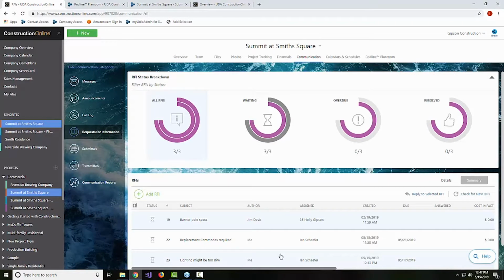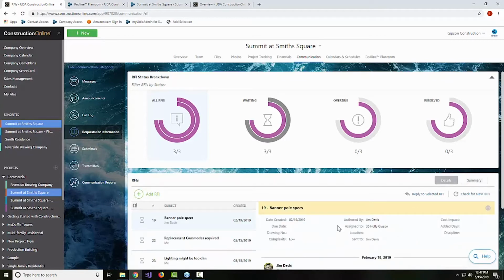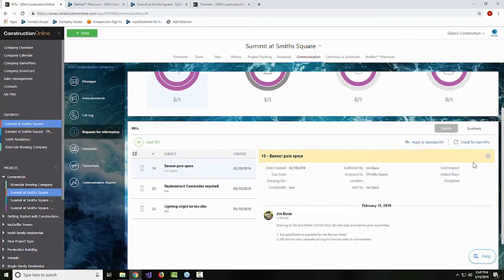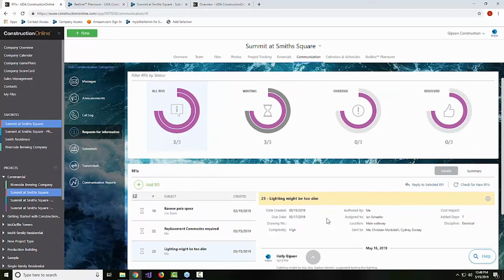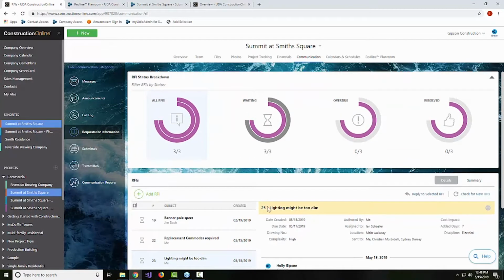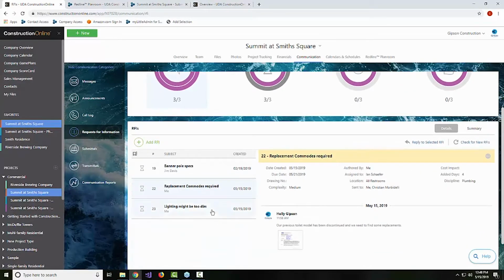Now again, just kind of briefly going through these questions before we step on to any of the last handful of pieces that we have for you guys today. Going back to RFIs specifically, just to clarify, when you're working within RFIs, the to field is reserved for everybody who's going to be answering questions. Assigned to is going to be for the person who's collecting all of those responses and closing out the RFI when they're satisfied with the responses that they've had.